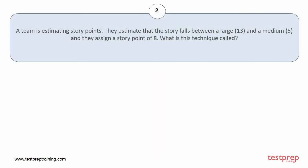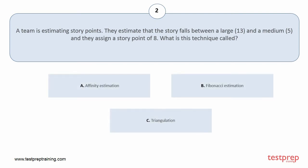Question number 2: A team is estimating story points. They estimate that the story falls between a large 13 and a medium 5, and they assign a story point of 8. What is this technique called? Your options are: A, affinity estimation; B, Fibonacci estimation; C, triangulation. The correct answer is option C.